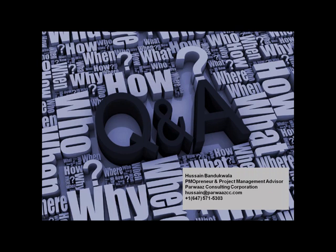Mallory made a clarification: she is setting up a PMO but is also the only project manager, and needs a criteria list to help select which projects she should take on — there are lots of projects in the enterprise and she needs to decide. That's really about project prioritization criteria. I think of the portfolio as a jar: you can fill it with rocks, pebbles, and sand. The rocks are your regulatory initiatives — projects mandated for regulatory, legal, or audit reasons. Those are the things you must do and they take highest priority.